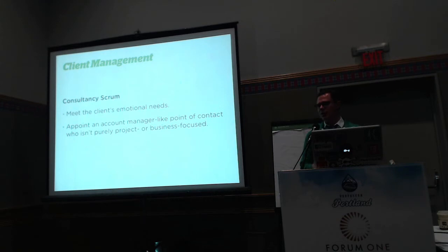day-to-day, constant negotiation. So you actually need to create 2 points of contact. You need to have a product owner type person, and you need to have an account manager type person. One fulfills the needs of the projects, the other fulfills the needs of the relationship. In product, internally facing Scrum, that relationship doesn't matter. Everybody's working for the same company, everybody has the same goal. But when you're a vendor, you have to be very aware of the emotional needs that are involved.